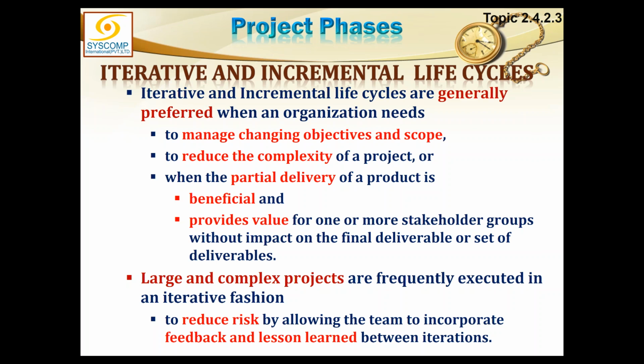And when the partial delivery of a product is beneficial, maybe I am delivering a product which can be delivered in parts. I have to deliver a whole building, but I say, okay, the first floor of the building will be complete and handed over to the customer, and we will keep working on the next floor, and so on and so forth. So partial delivery may be beneficial and provides value for one or more of the stakeholder groups without impact on the final deliverable or set of deliverables.